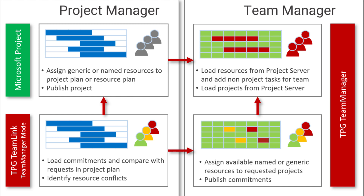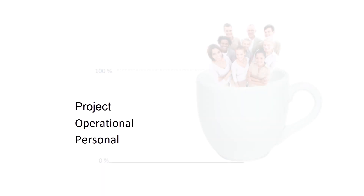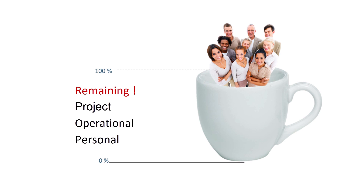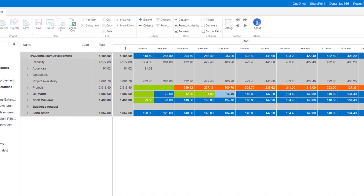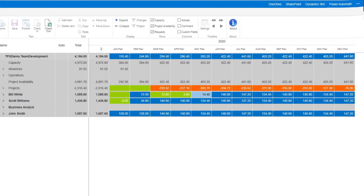By using Team Manager, functional managers can capture and analyze their respective team members' and other resource commitments towards operational, project, and/or personal activities like vacations. In making and recording such commitments, the team resource's remaining availability is automatically reduced. All this information incorporates timescale and heat map settings that make it easy to read and use.